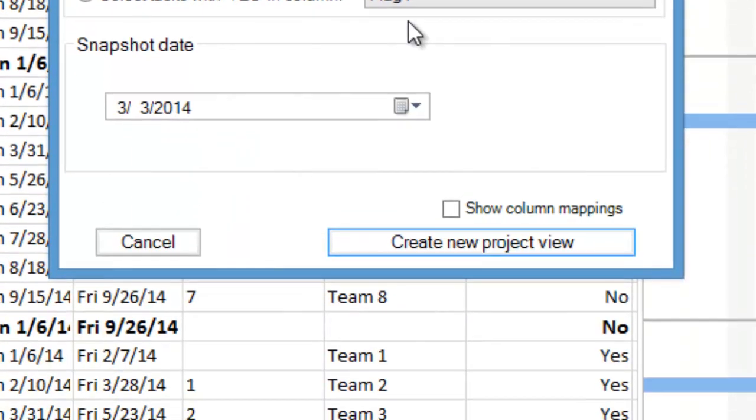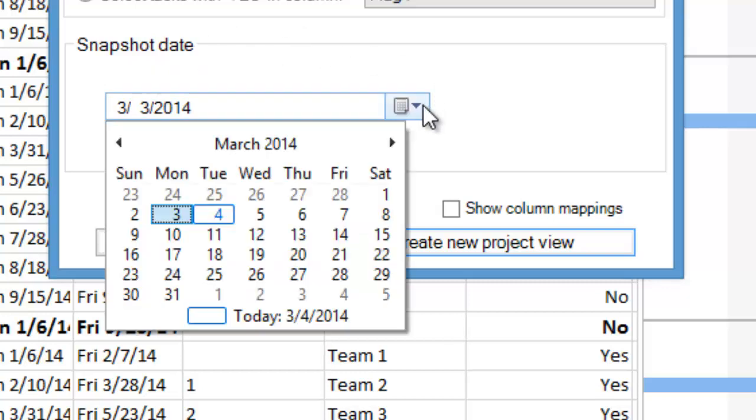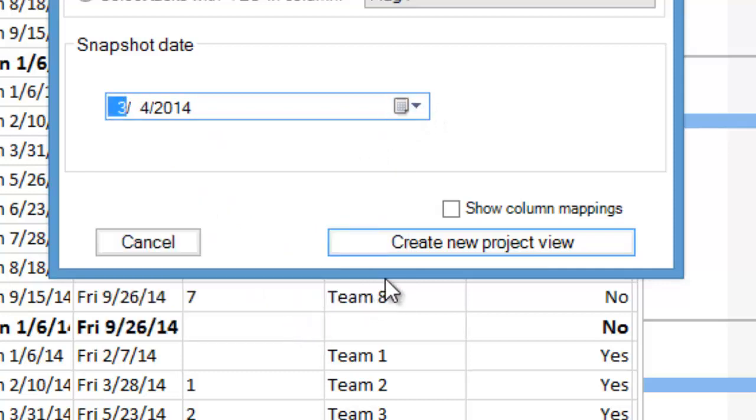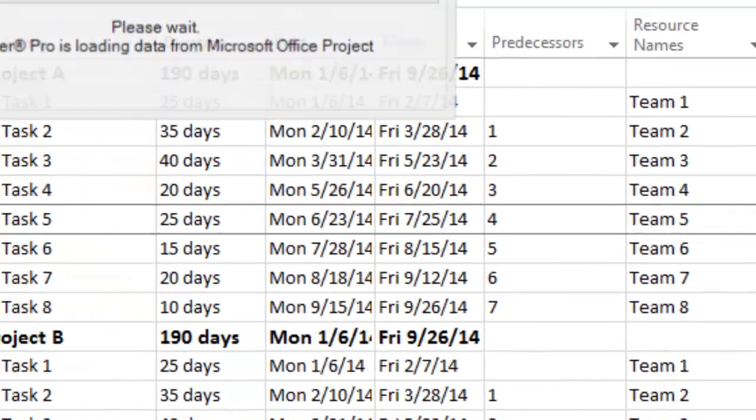Finally, we need to select a snapshot date for our OnePager document, marking the AsOf date of the summary level timeline. In this example, we'll use today's date. Now, click the Create New Project View button.